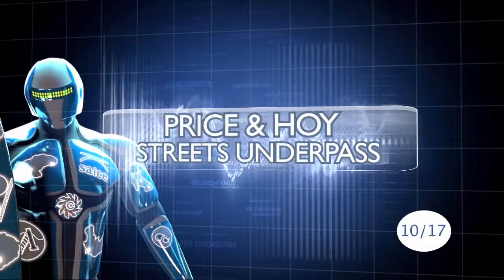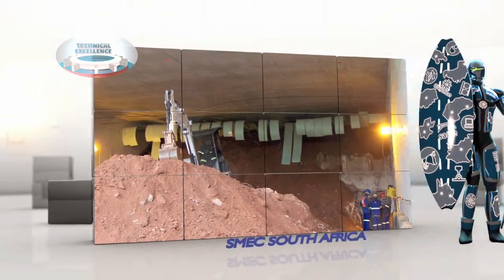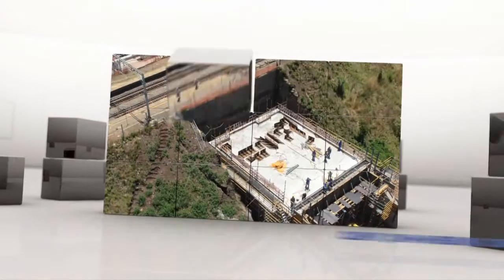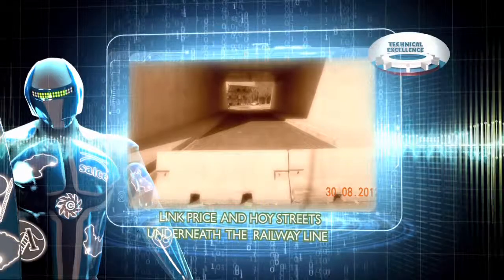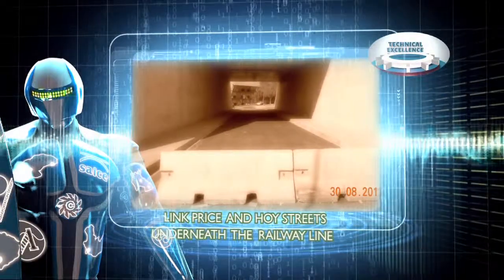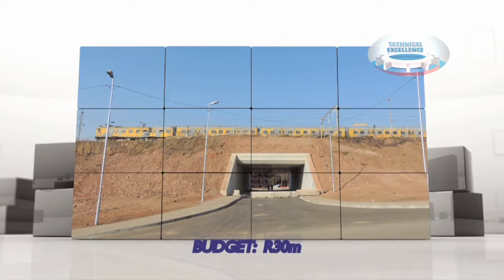Price and Hoy Street Underpass. SMEC South Africa submitted the construction of a road underpass between Price and Hoy Street in New Clare. The client, Johannesburg Development Agency, needed to link Price and Hoy Streets for the Rea Vaya BRT system to pass underneath the railway line without interruption of the rail service. Construction took 18 months with a completion value of 30 million rand.